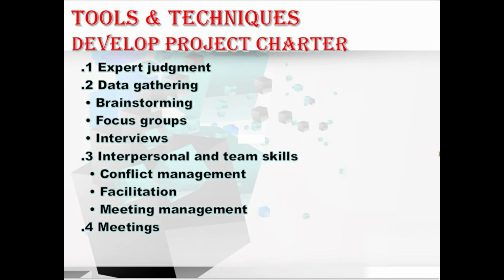Let's move to the last technique. We have meetings. For this process, the meetings are held with the key stakeholders to identify the project objectives, success criteria, key deliverables, high level requirements, summary milestones, and any other summary information. Okay, hope you understood now all the tools and techniques for the Develop Project Charter process.